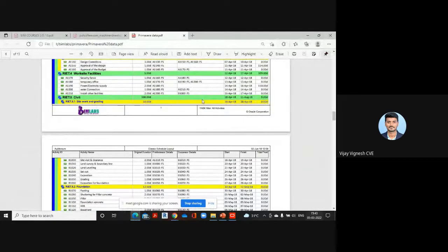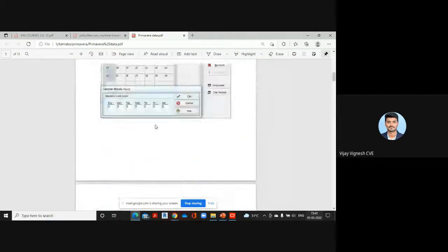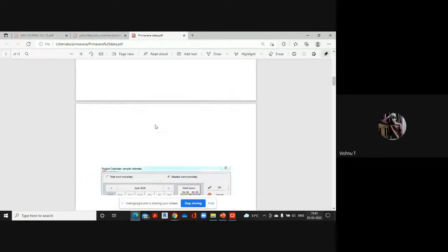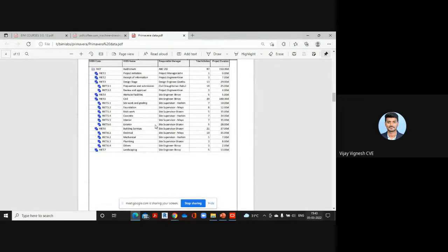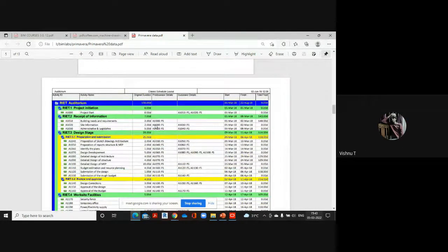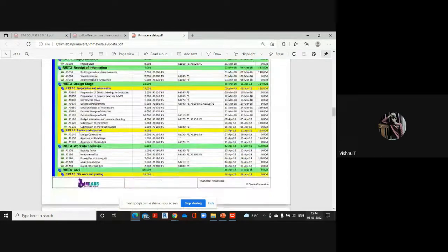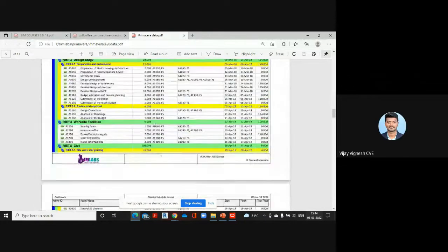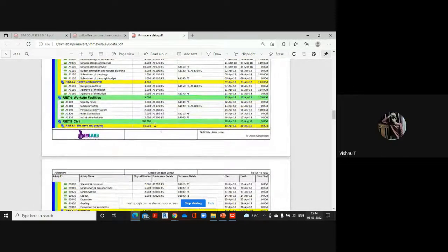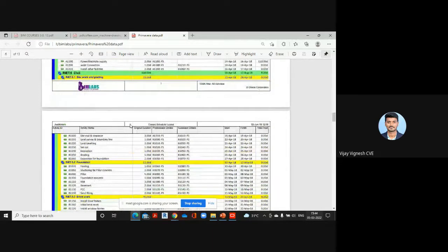But my doubt is, when you plan this, you have created this PDF document, and you're seeing this and doing it. But in actual practice, how do we do it? We will first plan everything, like the sequence of works and the various activities coming under that. Then we will establish relationships. After establishing relationships, we can schedule in Primavera. All the scheduling work will be done by the software itself. We don't have to do it. Understood, it's only the sequence of work that we'll have to provide.